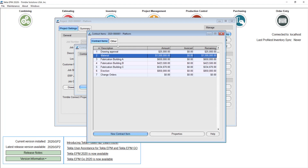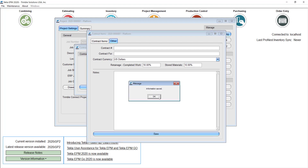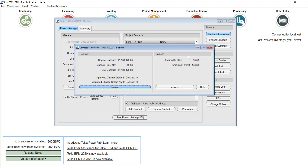Something extra to keep in mind: if you go to the other tab, you can specify things like the contract number, the standard or default percentage of retainage — which some people like to set from the very beginning — and also if you are charging for stored materials, that's something you can do from here. Keep in mind you can also modify this on an invoice-by-invoice basis. I'll save this and close the screen.